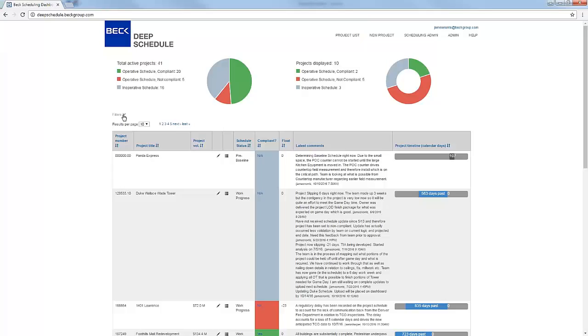We're actually expanding the file types now, but an MS XML file, when it's exported out of P6 or Synchro, it doesn't change the duration, because sometimes if you've ever used Microsoft Project between P6 and Microsoft Project, the durations will change because they schedule differently. One schedules by hours, one schedules by days. P6 schedules by hours, and so does Synchro.